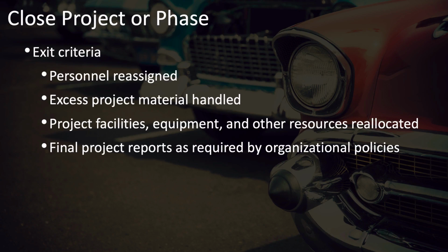That all of your other resources, including facilities and equipment, have also been released and reallocated as necessary back into the resource pool and available for other projects or other operational work. And that if you have any final reports that are needed, that those have been created and distributed.